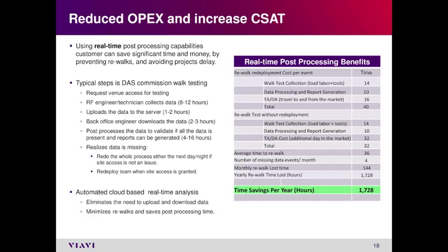To me, what happened was that if there was a venue and the game was the next day, we had to go back after a few days when the game was over. So in that time, I'm still not getting paid because I haven't delivered what I'm supposed to deliver, and at the same time, the operator is not happy because the network was not launched at the time that was promised.